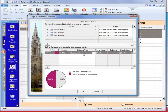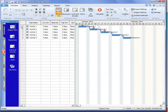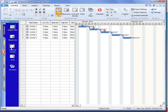We give it a chance that it will occur, then an outcome type — it's a relative delay — and we'll say 20%. When we go back to the schedule, we can see these risks have been added. It gives us a visualization, a visual cue that we've assigned those risks to those activities.